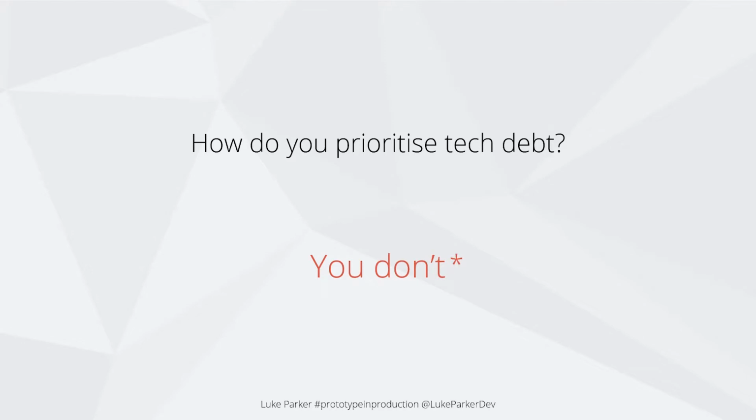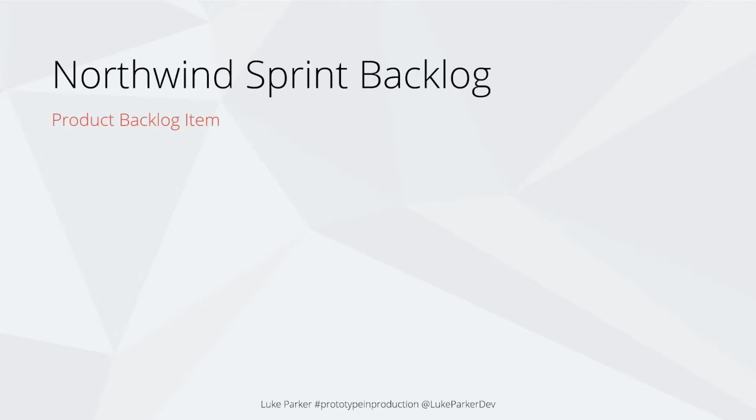If it's a really, really huge issue that's going to require 2 weeks of straight coding that's going to disrupt the rest of your team, then you probably need to raise a PBI and work on it solely. But if it's something you can sneak in a few hours or a day, then you need to do it as you do your current work, which I'll talk about why in a second. But first, let's look at an example backlog.